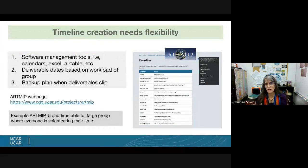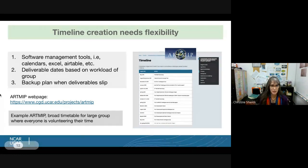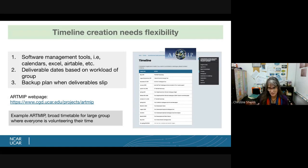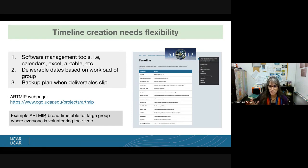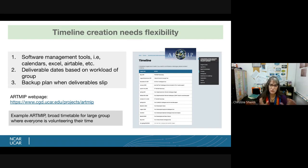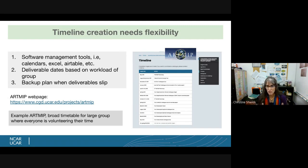The second overarching theme is that your timeline creation needs flexibility. When building your timeline, you have to build in problems that are unforeseeable and that are going to extend it. This was easier for ArtMIP because we're self-directed and volunteer — we can keep pushing the timeline back as long as everyone agrees. But it's not so easy if you have a hard timeline with deliverables. You need to figure out what your project is and how much flexibility to build in.